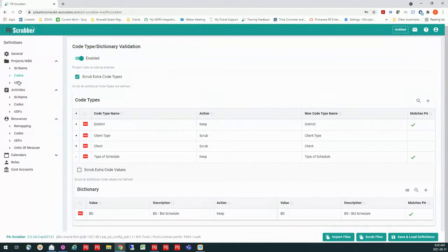Yeah, so for example, let's say the contractor is going to create the equipment list in their P6. You just want to let whatever they add for the equipment list come in, right? Because you've agreed they're going to build it. Correct. So this way you're not stopping them from creating, because you've agreed they're going to do it, and having that stuff come in your database.